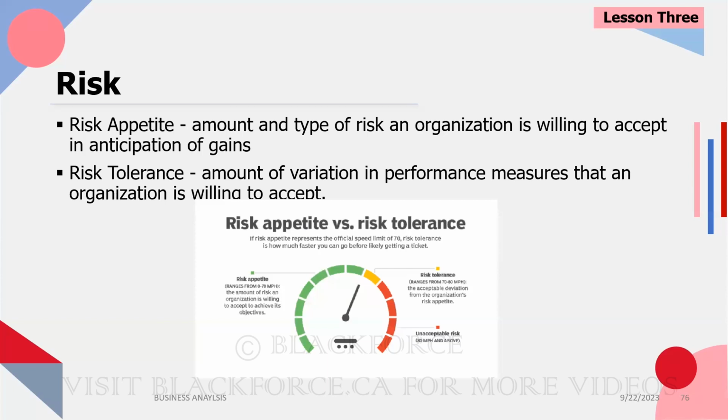Okay? So even on the project, we say that if at any given point the issues we have, the failed user stories we have, is 10% of the total developed user stories at any given point, if the errors we have is 10% of the total number of user stories we've developed, our risk appetite accommodates it.